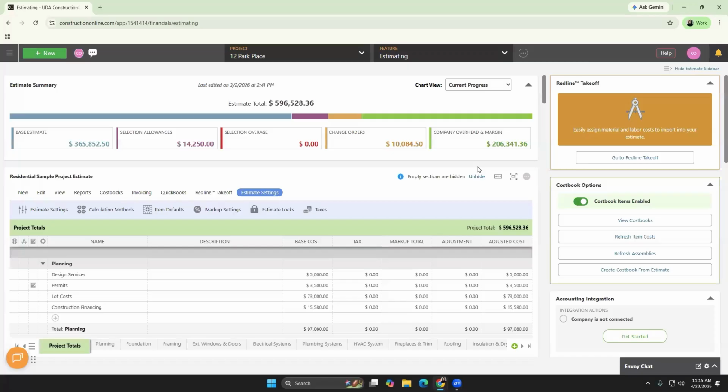So if you generate a proposal and something comes up later, maybe they did not have a pool and now they want to add one. The business did not have an elevator system and now they need one. Maybe certain things needed to change because of a code update, something that is going to change the scope of the job. That is going to be a change order. It needs an amendment to the original contract with the agreed upon scope.